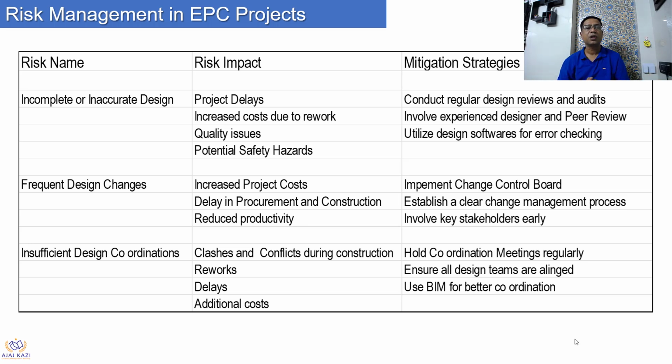And most important, why do the design changes come? Because you don't involve the key stakeholders early. So when they come late, they say, no, this was not supposed to be done, this was supposed to be done like this. Changes start there. So involve them early so that you reduce frequent design changes.